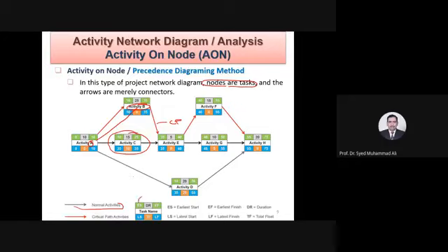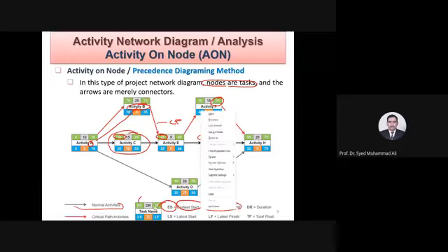The first one is called early start. The second one is called the early finish. Now this center one is the duration. That means something started on 10, takes 25 days and gets completed on the 35th day, and so on.